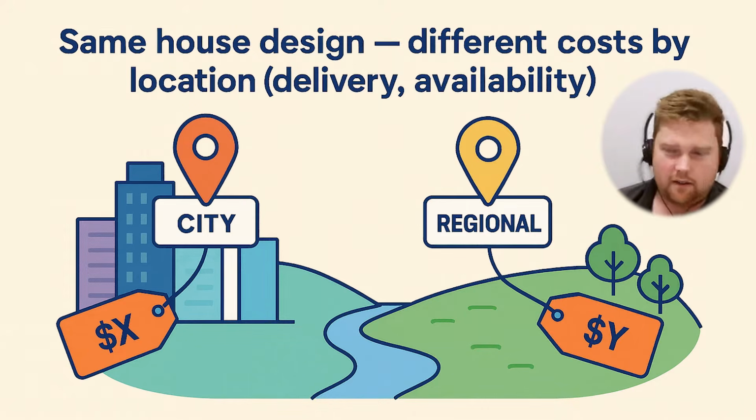I think the other thing that we learned as well is that not all builders are set up the same. One of the big things we talk about is the difference between having your own employees, so the way you track labor, compared to using subcontractors, and then how you use a mixture of both. And also what that means in your price list: if you're not buying the Rio and that's coming as part of a supply and install package, then it doesn't make sense for you to be quoting Rio all the time.